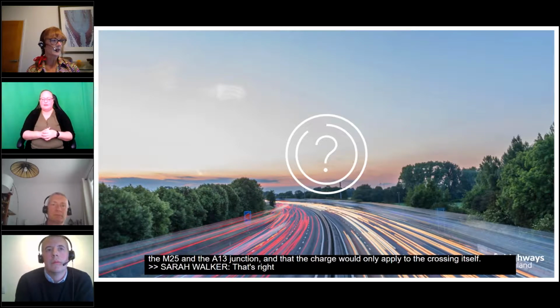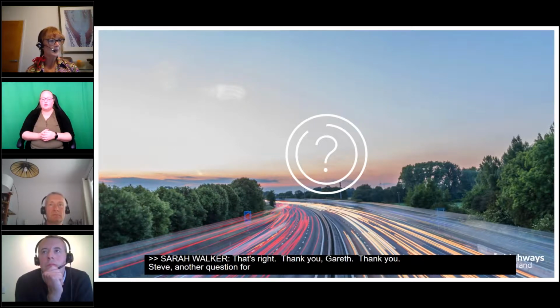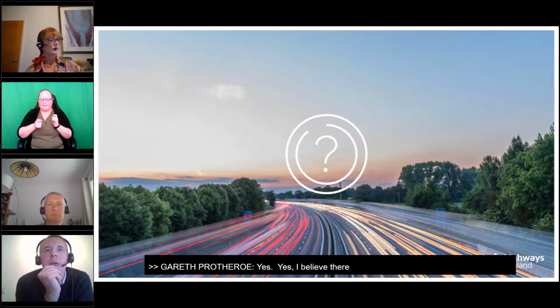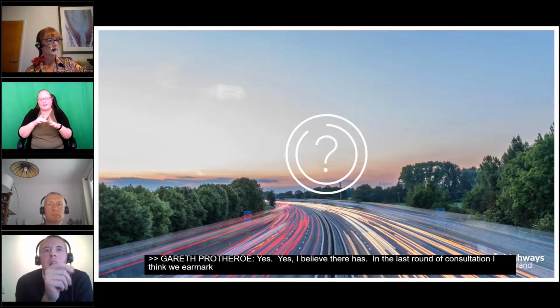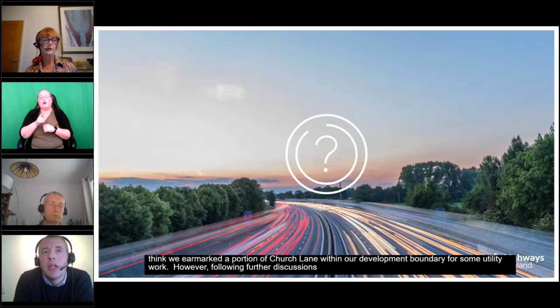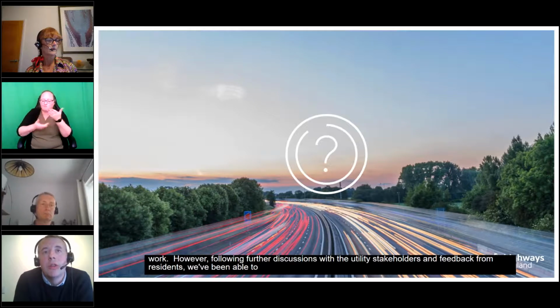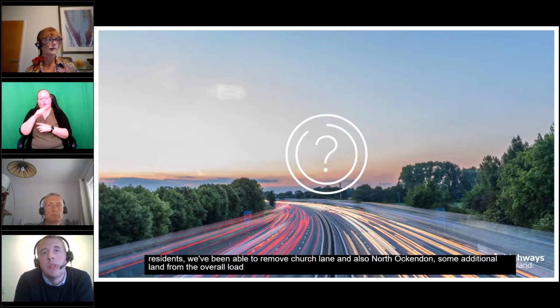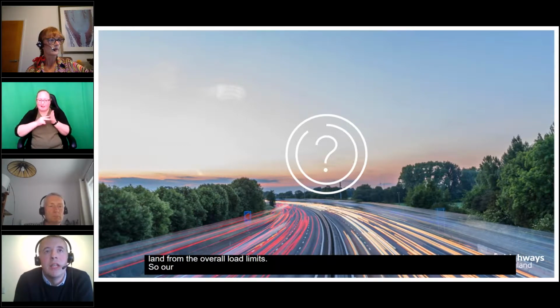Thank you. Steve, another question for you. Has there been any change to Church Lane in North Ockendon? Yes, I believe there has. In the last round of consultation, I think we earmarked a portion of Church Lane within our development boundary for some utility work. However, following further discussions with the utility stakeholders and feedback from residents, we've been able to remove Church Lane and also North Ockendon, some additional land from the overall order limits. So our proposals have been refined slightly, and we no longer need that portion of Church Lane.